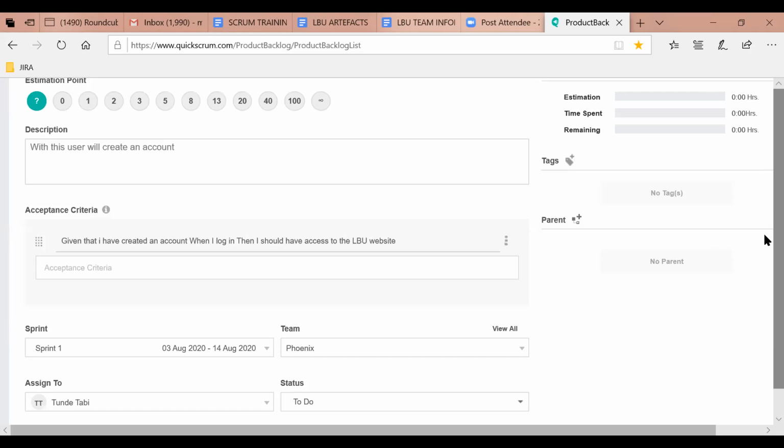We tend to call the person that says 1 an outlier. In other words, that person's estimation is too far from what everybody else is saying. And this is where you really need to have a conversation. Why are you saying 1? Everybody else is saying a 5. Because you just don't want to agree with the most experienced person in the room, for that matter. So the conversation we have will now determine, we run another poker and then we run another poker, okay?